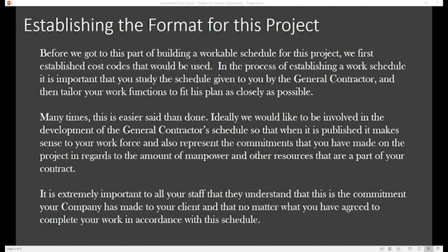And that's a really hard thing for a lot of people to understand, is, well, I slipped a day here. Well, guess what? That's your contract, and there are penalties for causing other people damages or delays, equally as much as if a person holds you up for 2 or 3 days and you're unable to do your work or you have to accelerate to do your work, you should be entitled to the money associated with that. So the schedule just gives us a framework in which to establish our contract requirements as they go on a daily basis. So we then continue down, and let's see here.